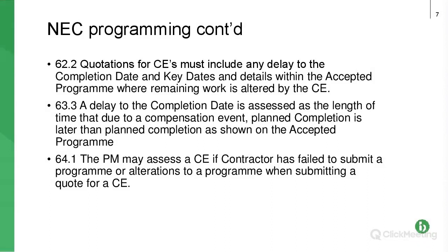So other parts of NEC that refer to programming, so this is all connected with the point that I've already raised. If you are applying for a compensation event, and a compensation event can include money and also time, if there's any delay in relation to that compensation event, at that point you need to provide a programme.